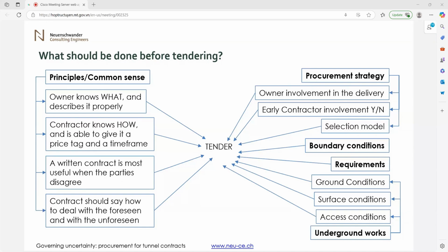Now, there's a saying that says, if you pay peanuts, you get monkeys. And you don't want monkeys for consultants, with all respect. But if you want a good consultant, the choice of your consultant should be quality and price-based and not only price-based.